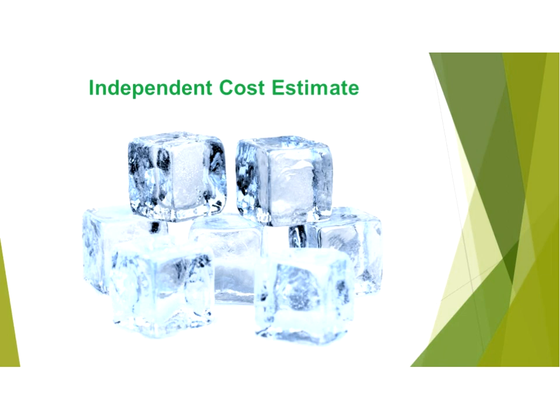That's why I encourage you to obtain price sheets from peer agencies that have already procured the functionalities you want. Use their first year costs and current year costs to form the basis of a very solid ICE. Comparing first year and current year costs gives a good base for estimating cost hikes in future years. For budgeting purposes, a local decision-making process may require an ICE that covers a multi-year period.